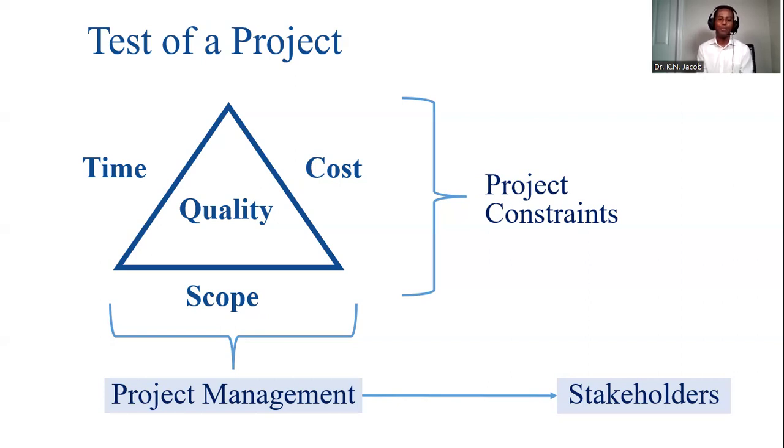Those are stakeholders. Now, the people who live along that stretch where we are going to have the construction site, these could be owners of farms, residential homes, businesses, owners of gas stations that are going to be affected as we implement this project. Some houses might be demolished, others will be affected by the dust. All these are critical stakeholders to the project.